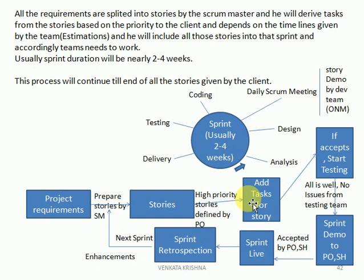Once tasks are added to a story, the development team will give a story demo — also called an ONM (over-net meeting). The development team gives this demo to the testing team because if the story is not working and the testing team accepts it anyway, we lose time. So for each and every story, the development team gives a demo to the testing team, and we need to accept it before we continue with further testing on that story.